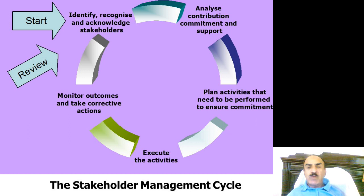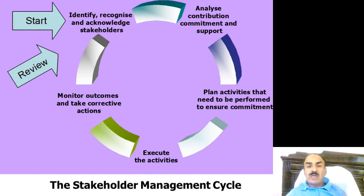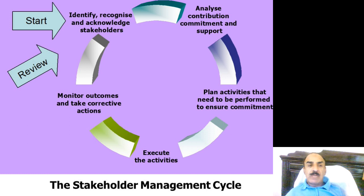The stakeholder management cycle is a stepwise approach. The first and most important step is to identify and recognize stakeholders — the people, communities, and groups that can positively or negatively affect project performance and objectives. Once identified, you analyze their contribution, commitment, and support. Then you plan activities to ensure commitment from different stakeholders. You execute those activities, then monitor the results, and use the feedback to further improve your stakeholder management process.